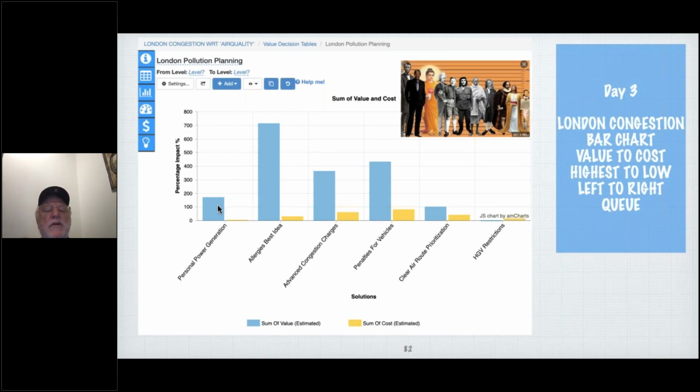Okay. So what we're doing is we're prioritizing the high-level architectures. And now, if this low cost turned out to be a month, we might decompose this into 4 subsets and find things we could do each week. But it depends on whether you're okay with a month or you need to do it at a weekly level.